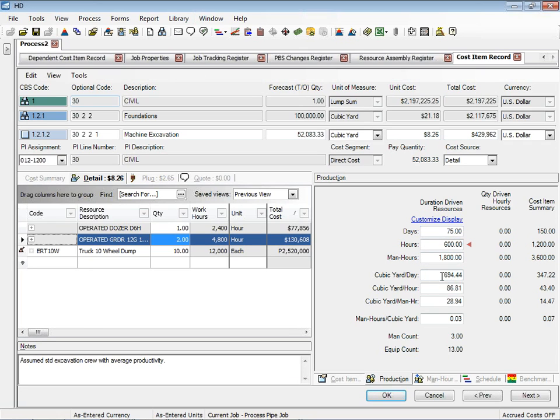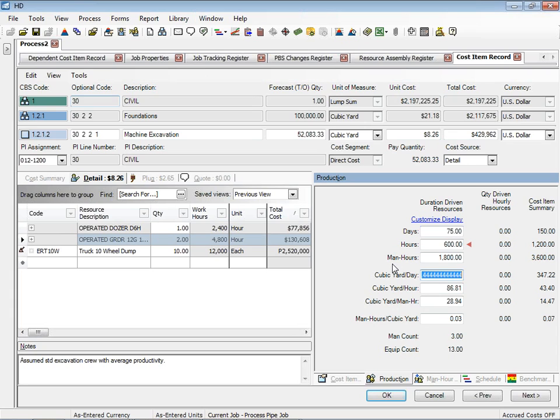Okay. The other way to go is from the bottom up. If we know that this crew can only do 400 yards a day, right, or we can achieve 400 yards a day, now that gives us a duration. It calculates a new duration of 130 days, 1,041 hours based on how many hours per day we're working. And then that duration could be passed over to Primavera. So that can go both directions. The resources themselves, as you saw, do go back and forth between HardDollar and Primavera. So we can resource load this task with the HardDollar resources, so you don't have to type them in twice.